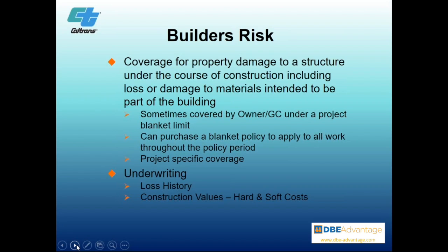It's usually dictated by the owner or the general contractor. There's a blanket approach that they usually use on this. It can be project specific. And once again, it's based on your history as an operator, what kind of claims you've had, and also your construction value. There's hard costs and soft costs. There's labor, and then there's materials and construction. Those values in the contract will determine the underwriting costs and, of course, your performance loss history in the past.